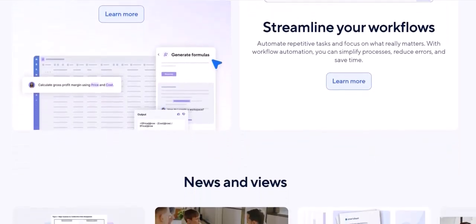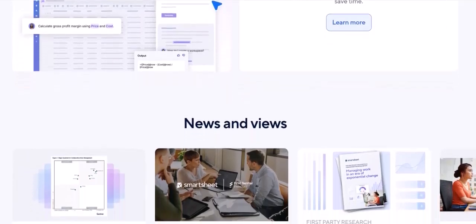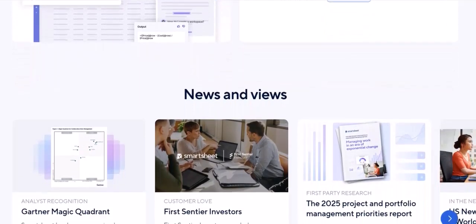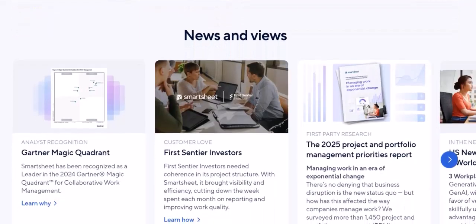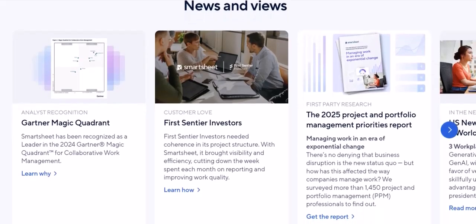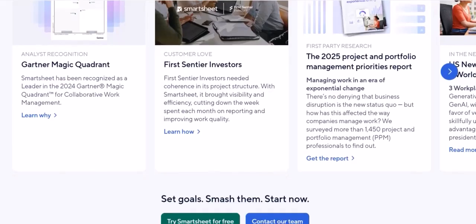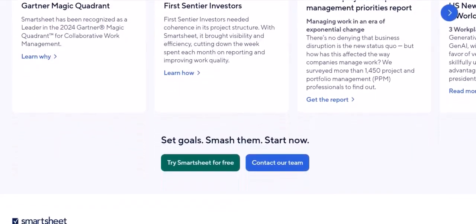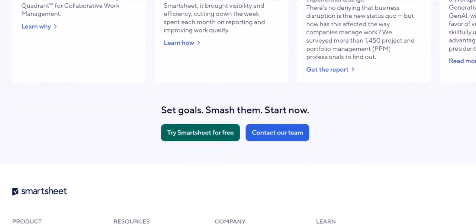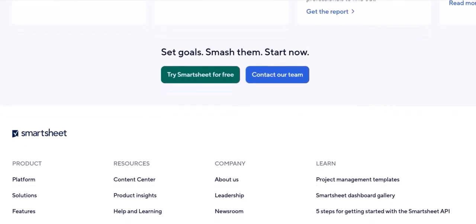Trigger granularity. Triggers are often tied to rows or dates. For example, you can't easily trigger an automation based on a summary report changing. You also cannot trigger an action based on a complex "or" logic with multiple unrelated conditions without creating separate automation rules. For instance, if status is stuck or blocked and assignee is John Doe, you might need multiple rules to handle this effectively.